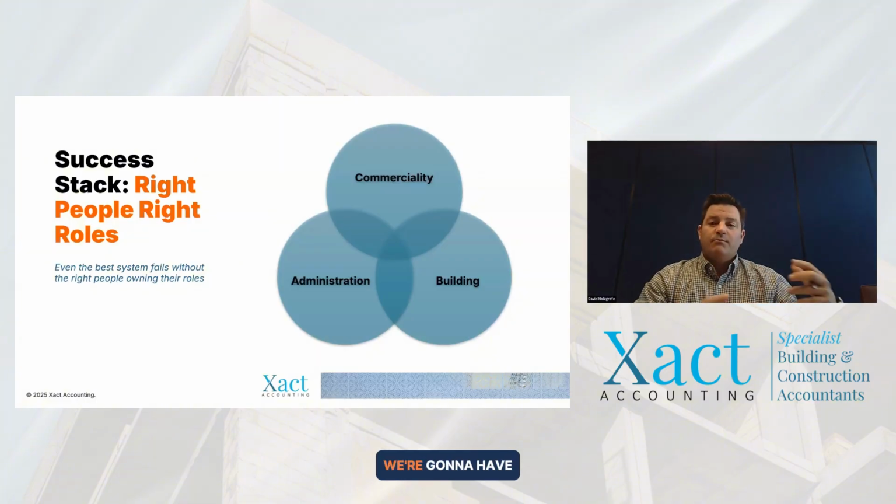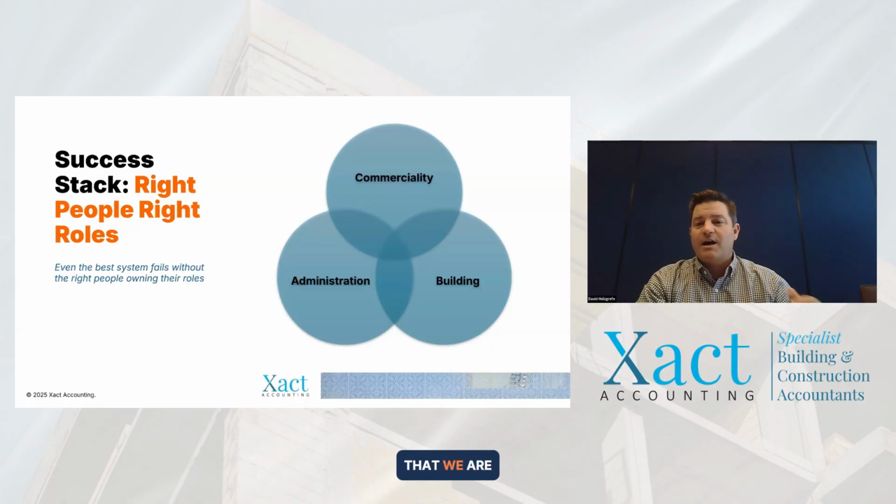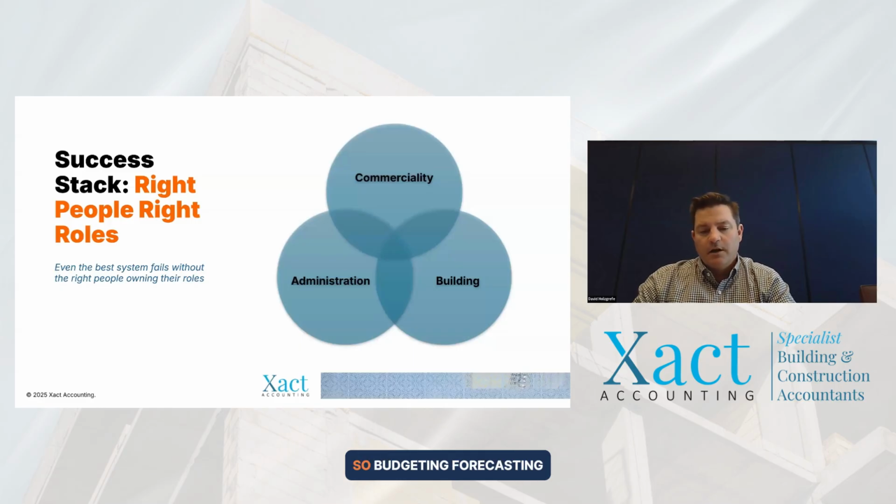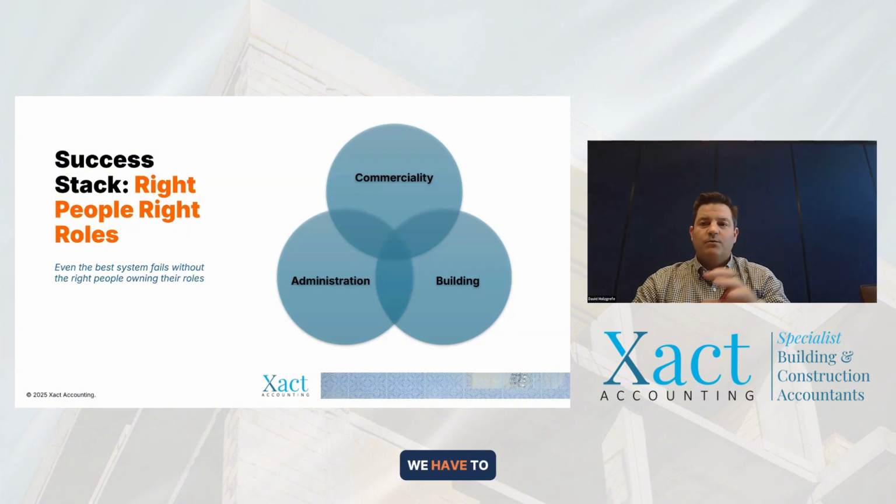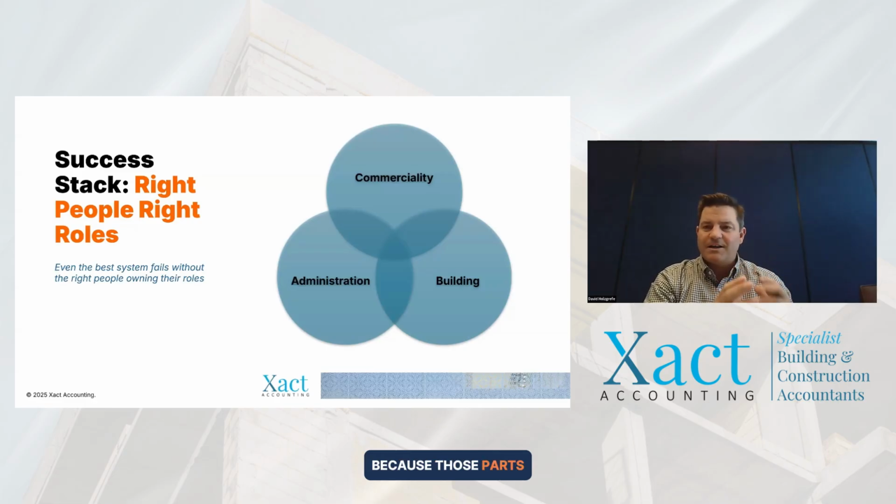So then we've got to have the administration side follow behind that, to make sure that if we've got time bars, we are lodging those things in the correct time so that we don't preclude ourselves from any of those things. So there's lots of moving parts. Budgeting and forecasting is critical to support this, but most importantly, we have to have the right people in the right seats. If we've got the best builders, but our commercial skills and our admin skills are not up to speed, we're going to lose margin, hurt ourselves, and not achieve our budgets and forecasts, because those parts aren't keeping up with the fact that we're doing really great work on site.